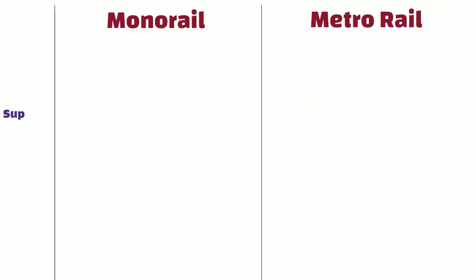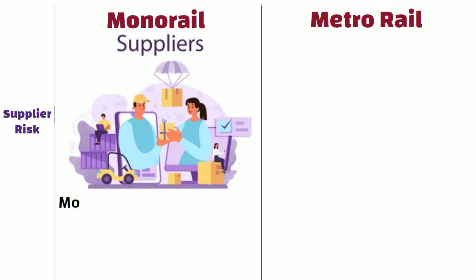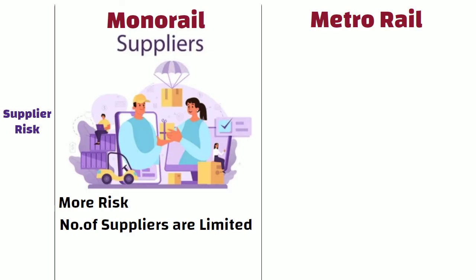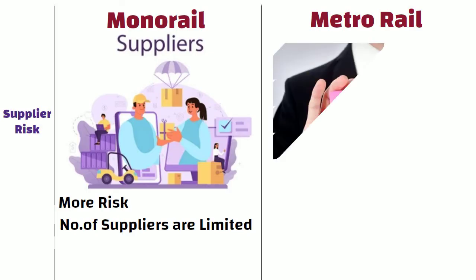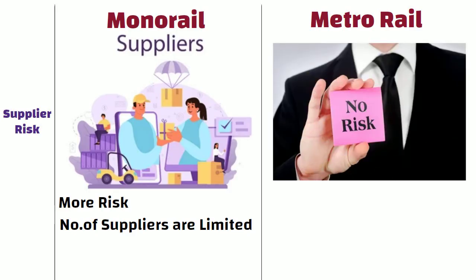Supplier risk. Monorail procurement carries more risks than metrorail, as the number of suppliers is limited. Whereas in the case of metrorail, there is no such risk.